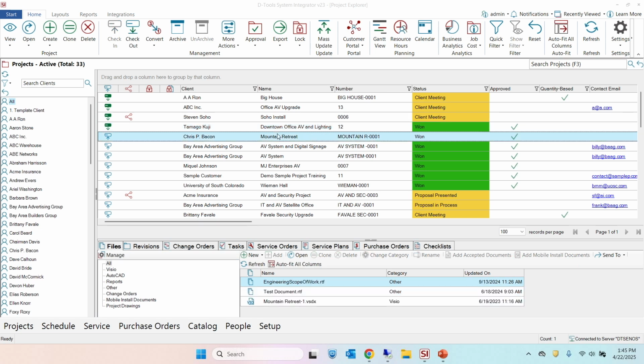Job costs. Let's talk about this. Such a fun topic, job costing. As you know, we do have job costs here. If you don't, now you do know that we have that. Job cost is up here to run on any project or projects. And the way we've set this up initially was that when an item is marked, you get to choose whether it's picked, ordered, received, or installed to count towards the cost of the job.